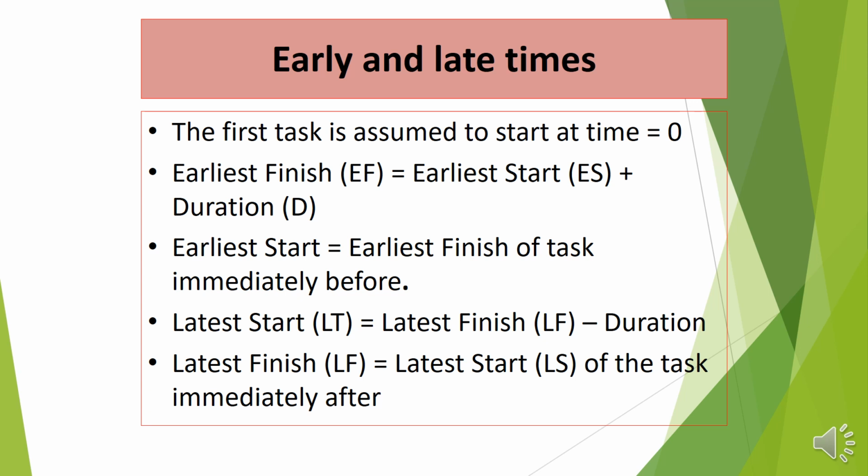So that is the time when the project ends. And so the latest start for it would be latest finish minus duration.